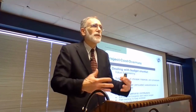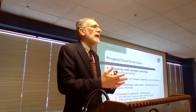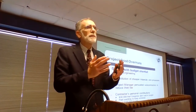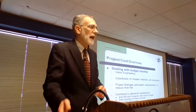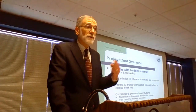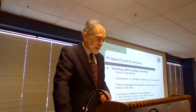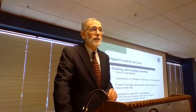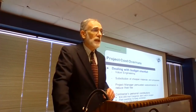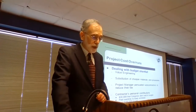So how did they deal with this budget shortfall? Well, one, they did value engineering. So looking at whether there are cheaper ways, cheaper materials to do the same function to still get what we want out of the project. So they substituted cheaper materials, cheaper processes. The contractor ultimately ended up paying $30,000 of his own money to complete the project, and he lost a total of about $200,000 on the job.